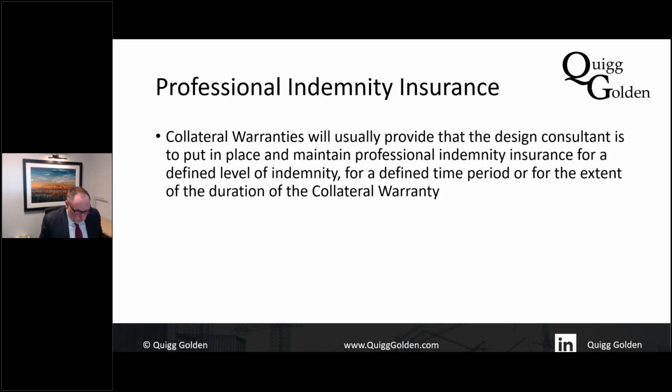You'll also often have a clause in there saying that the provider of the warranty will maintain professional indemnity insurance for a certain period of time, and you should just be aware of that and register that with your company administrator so that that insurance is kept in place.